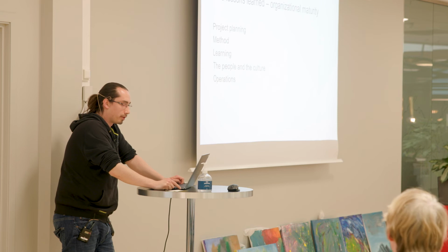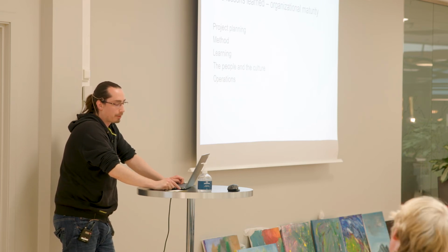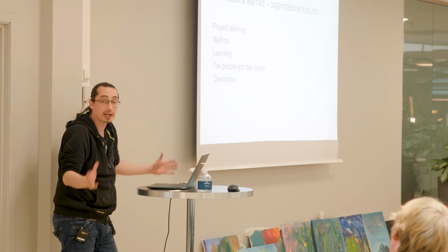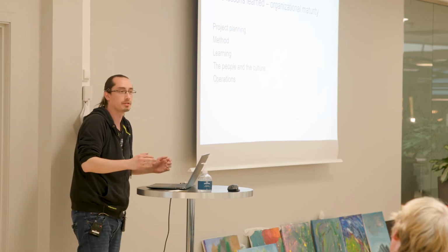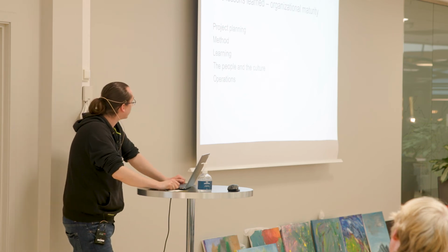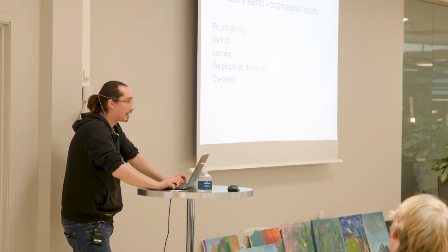It turned out from the estimates that I've seen later on is that about 1/3 of the time we spent on what we deem as construction hours, code development, was for infrastructure. So the huge learning point that we have made abundantly clear to everyone involved in the organization is that from now on, infrastructure is development. Don't ask any questions, it just is. And that is what you need to do.